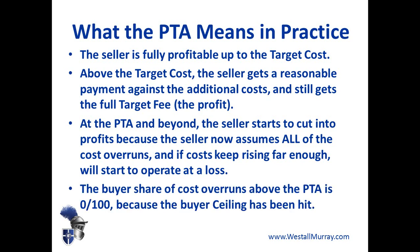The other way of looking at the PTA is that effectively at the PTA, the buyer's ceiling has been hit. Above the PTA, the buyer is paying none of the cost overruns — they are the entire and full responsibility of the vendor to cover.